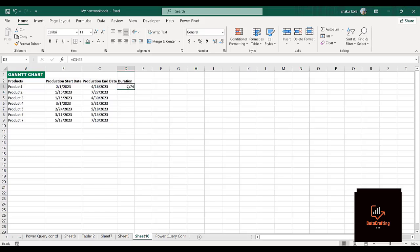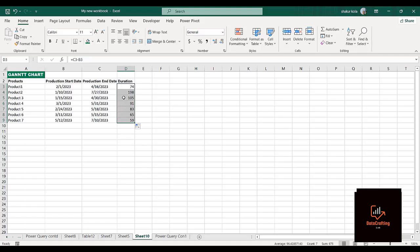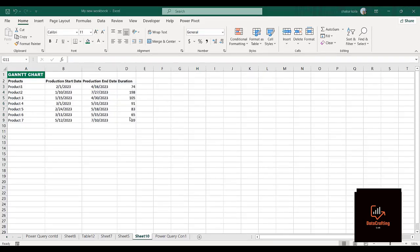To get the duration, it will be equals to the end date minus the start date. Click on enter. This is the duration it takes to produce this particular product. I'll just drag my cursor down. After dragging down you can see this is not in a date format — it's actually in a number format. We'll come back to this later.